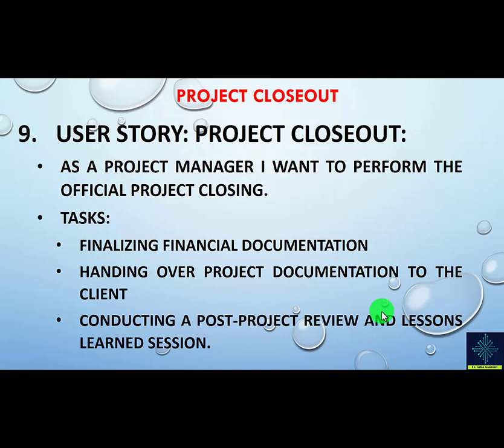One last user story related to the project closeout, again from the project manager. As a project manager, I want to perform the official project closure, or project closing. Tasks involved might include finalizing financial documentation, handing over project documentation to the client, conducting a post-project review and lessons learned session.